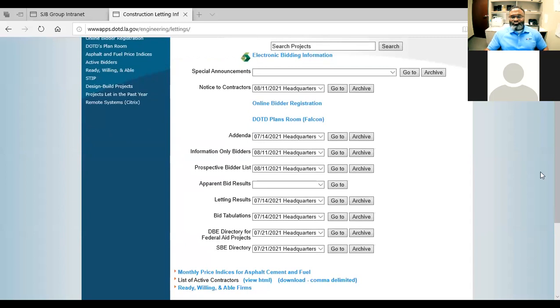It can be very helpful in getting a ballpark idea for what the work should be. There's a caution. You may or may not know the particulars of that project and how it fits with the one you're looking at in particular. But if you look at the website's posted bid tabulations for a number of jobs, and you do this regularly, you get a sense for where your price might need to be, at least a direction to move your thinking as you're developing your estimates.